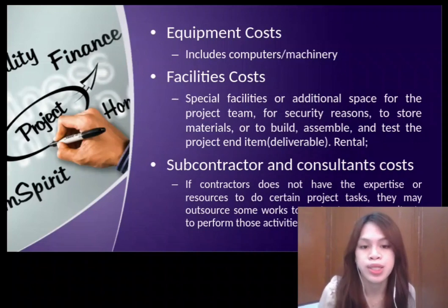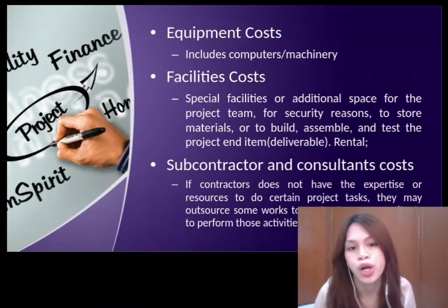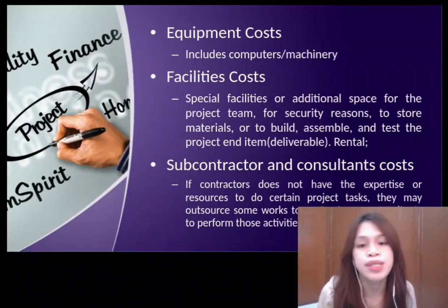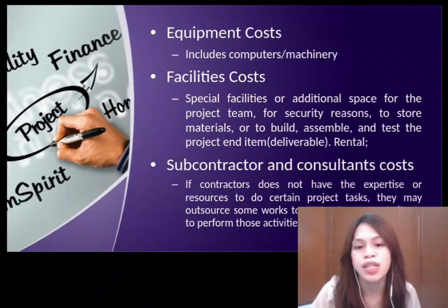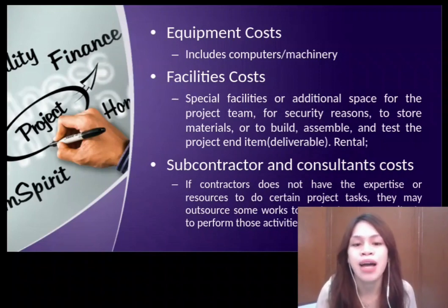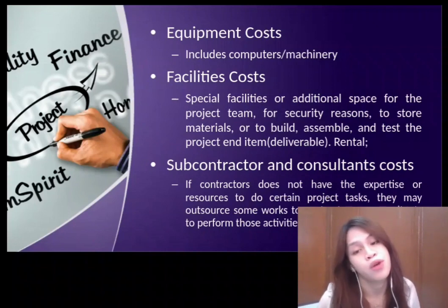However, outsourcing work to contractors or consultants can also have cost implications. The cost of subcontractors or consultants may be higher than if the work were performed by the contractor's own team, and additional costs may also be incurred, for example, in managing the work of multiple parties. Therefore, it is very important that contractors carefully evaluate the cost first and also the benefits of subcontracting or outsourcing work to ensure that it is a cost-effective solution for the project.